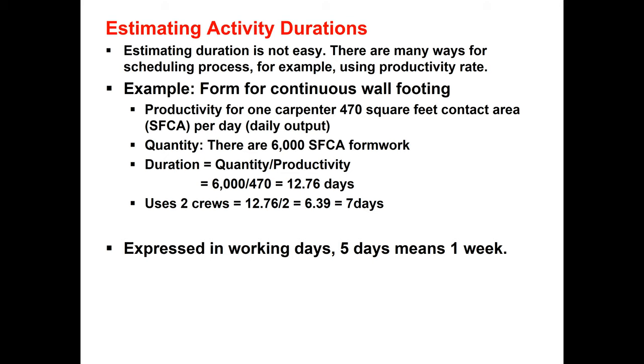So from the drawings, we know the quantity of work, and the productivity rates are available online. So from each quantity, we can estimate the time for each work in your project.